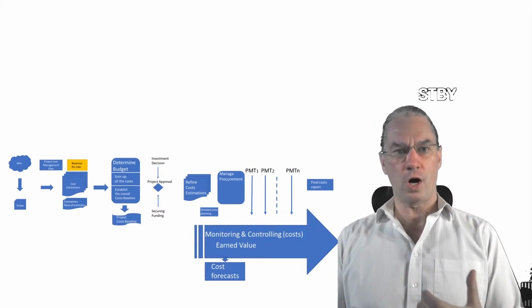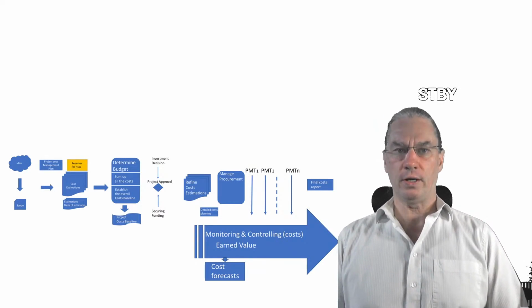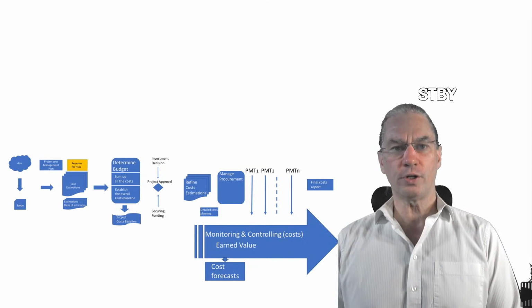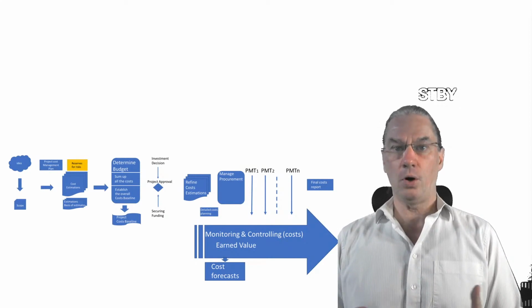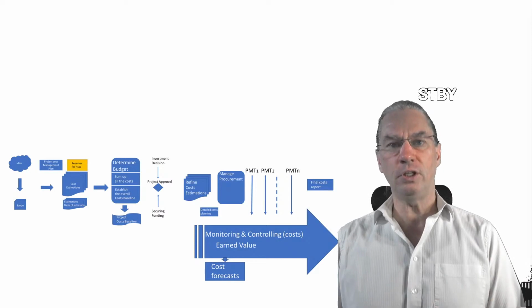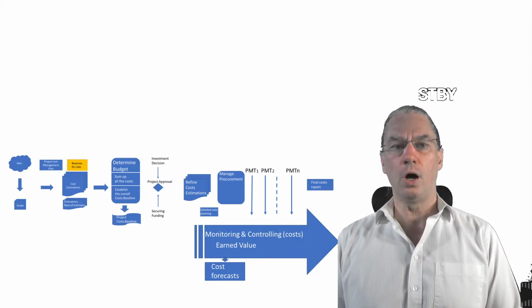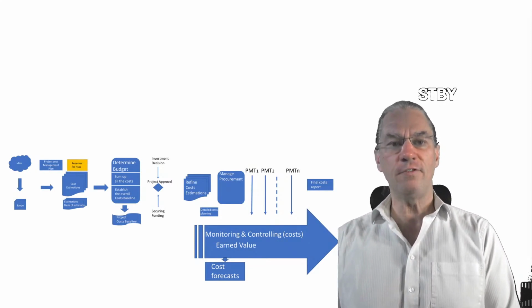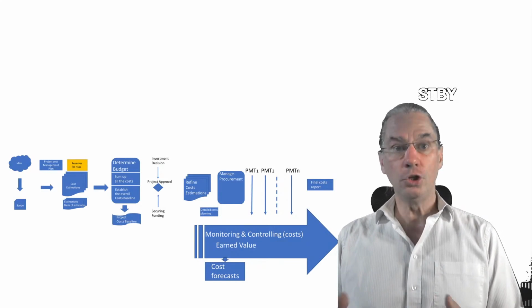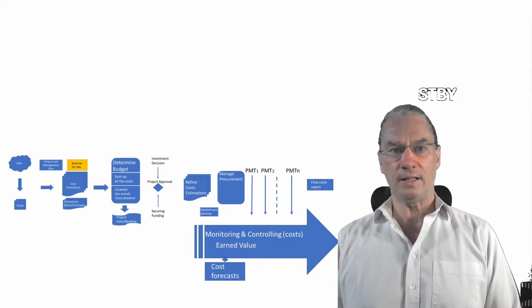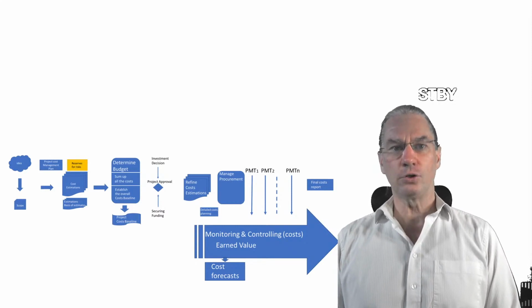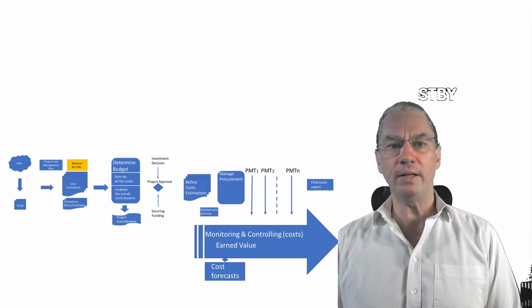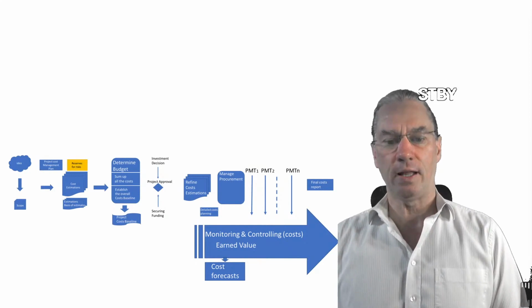That controlling will show us whether the project is going in a good condition, or whether there are situations where the project manager needs to be concerned, and maybe also the stakeholders, and intervene, because a project could all of a sudden cost more because it's lasting longer, or because there are difficulties in the project. Normally, you should have contingency reserves that should cover this. But of course, as we know, many unexpected things can happen.